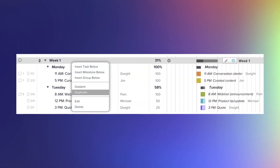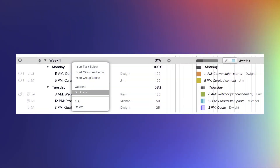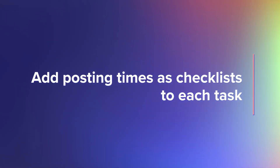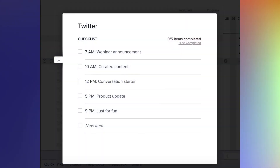Got a rhythm to your posting schedule? Set up your first week's social media plan, then right-click on the task group name and select duplicate from the drop-down menu. Once you've duplicated a task group, rearranging your social media schedule is as easy as dragging and dropping tasks into their new place. TeamGantt's checklist feature enables you to streamline your plan by adding to-dos within a task, so you don't have to create multiple versions of the same post just to cover your social media bases.